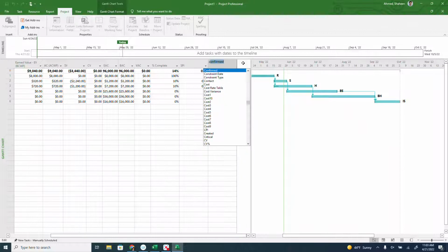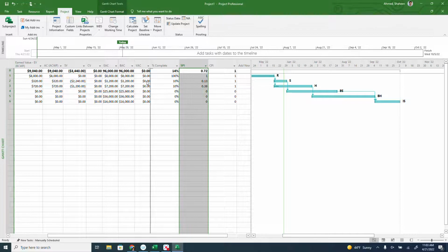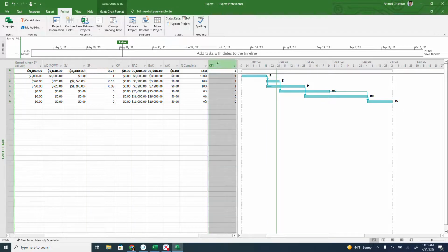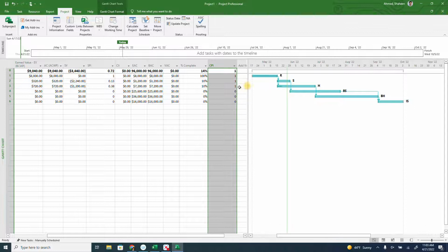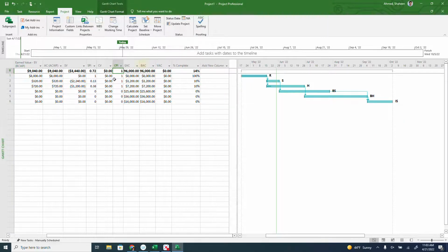also the cost performance index, and I will basically move this schedule performance index close to the schedule variance because they're basically exact same thing. And then in terms of understanding, moving there, same meaning basically. So one is ratio, one is just subtraction. So you can see that less than one means we are behind the schedule, one is okay, and things like that. Now we still don't see any cost variance because we didn't have any information on that.